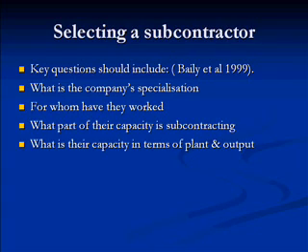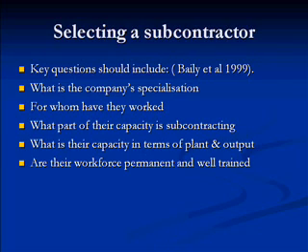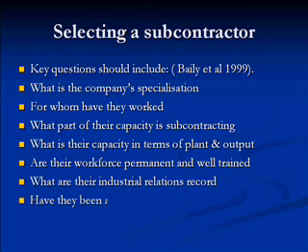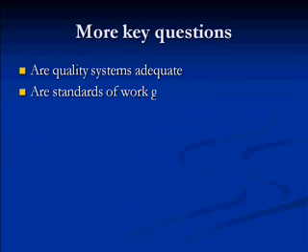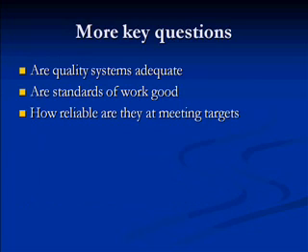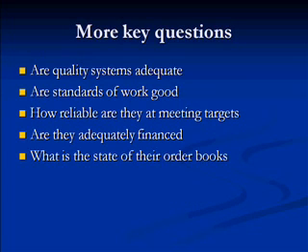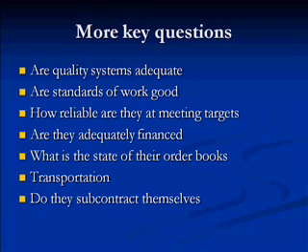So what I need to know is who are the people who are specialized in welding, how much money are they going to charge, what is their reliability, what is their throughput, how is their relationship, have they been approved for government work or not, are their quality systems adequate, how financially good are they, how is their employee skill set and everything.